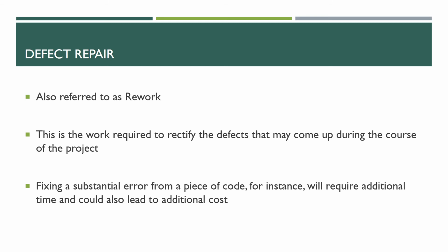So defect repair can also lead to major changes, and a week of rework obviously changes the project schedule, it obviously changes the project cost, and it obviously requires a change request to be raised and approved by the CCB before you can implement it. So defect repair is thus a major contributor to changes, and this is where change comes from. Let's move on to the third point.